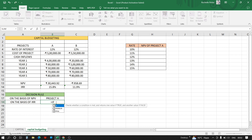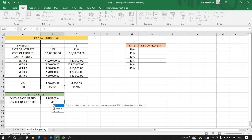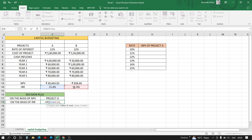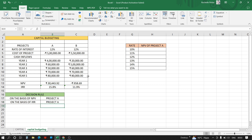Same for IRR: if IRR of project A is greater than project B, then we'll choose project A, or else project B, close bracket, Enter. The first part of this question is now done.